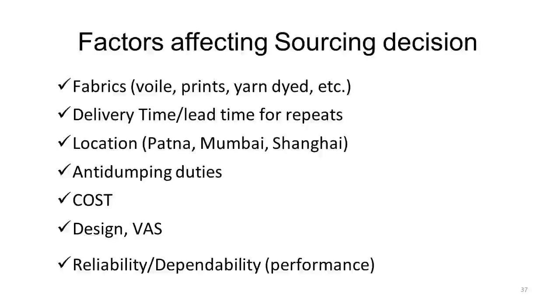What would be the reason? Because the guy in Mumbai is giving better quality. The lead time is not so great because they are based out of Mumbai, but then it hardly takes 24 hours or maybe 48 hours by bus or by train to transport the product from Mumbai to Patna. So yeah, I can live with those extra 2 days. But then the price and the quality are very different. The prices are much better and the quality is absolutely fantastic. The factory in Patna is giving very shabby quality.